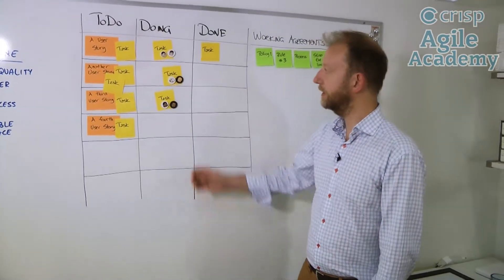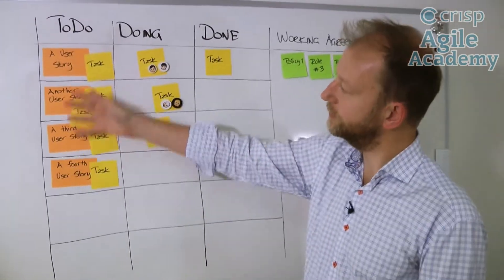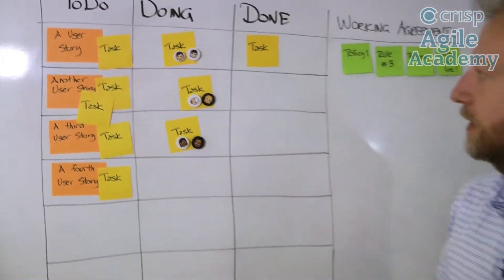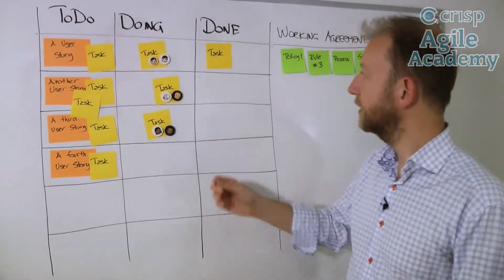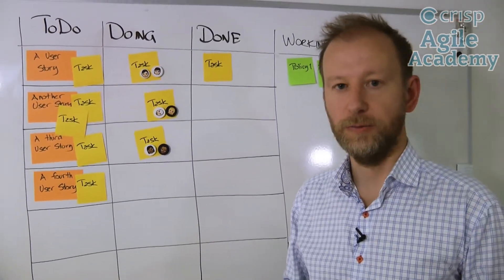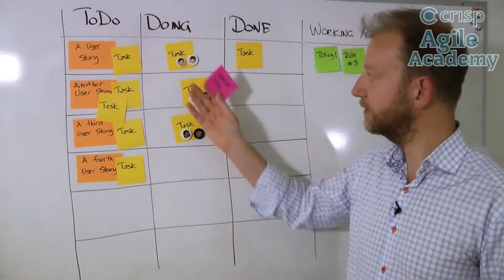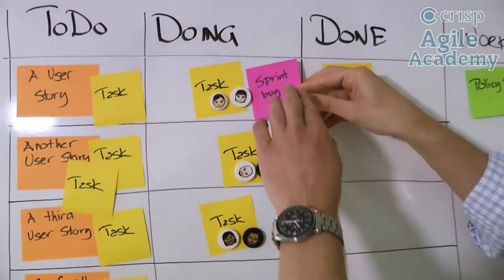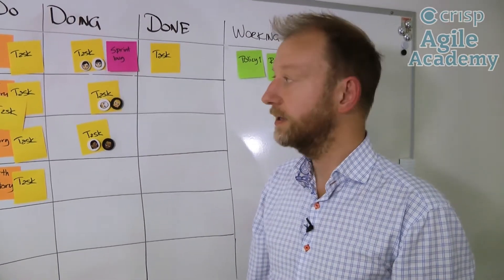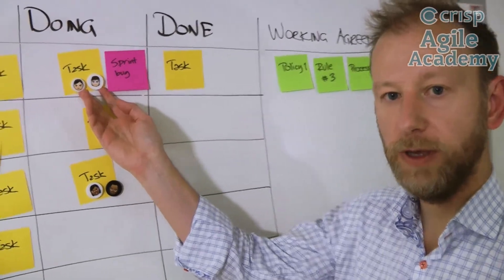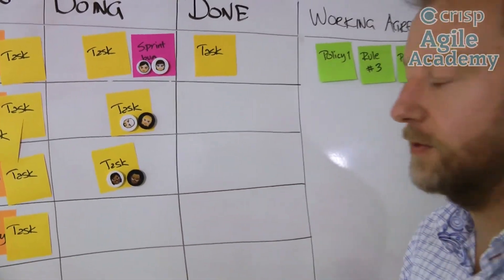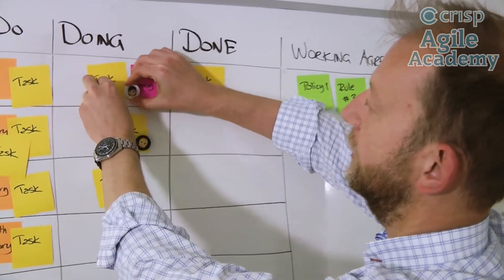Consider your standard sprint — here's your scrum board. We have four different user stories here with their tasks, and we have three different pairs working on their user stories. Let's say that during testing of one of these tasks, they find a bug. You don't file a bug report in your bug reporting system. Instead, you talk to the developers and you put up a little post-it that says we got a bug here. As soon as practically possible, these two stop the line — they stop what they're doing and start working on the sprint bug instead. As soon as they fix the bug and verify it with automatic tests, they continue where they were before and put the bug to done.